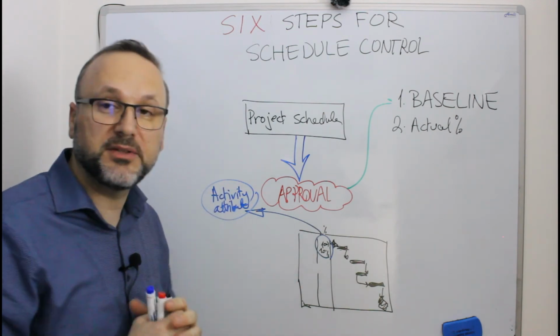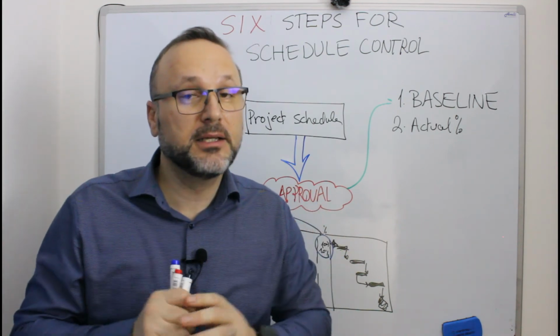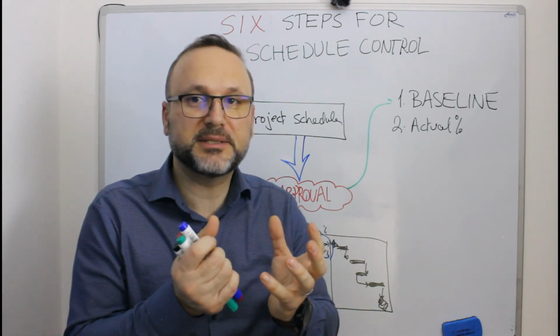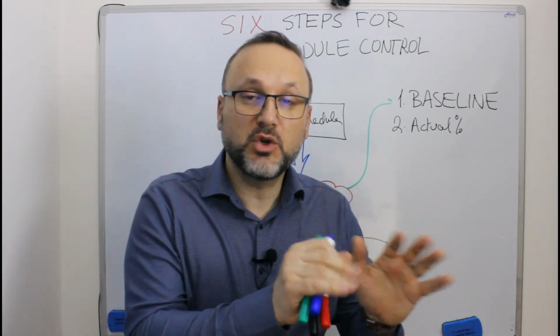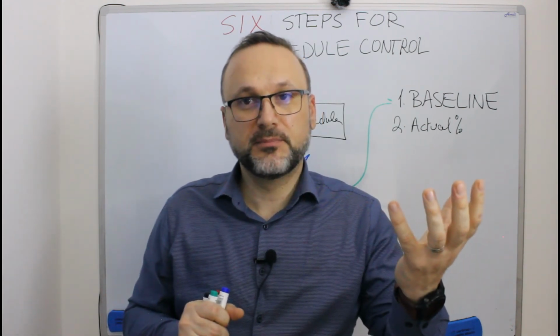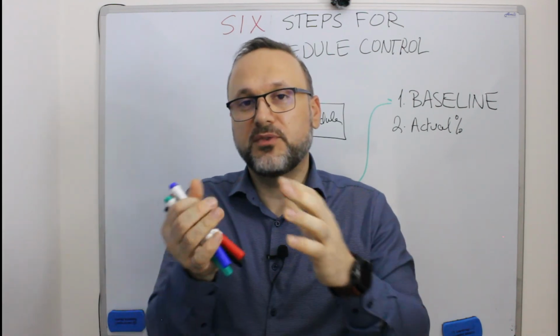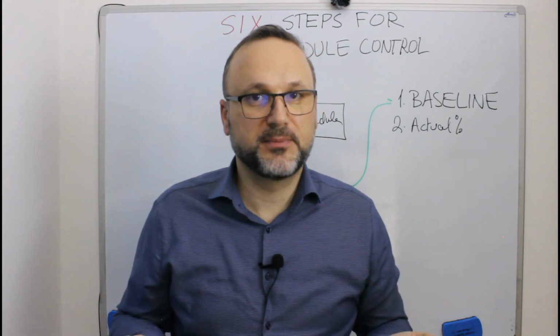Let's say in one activity, you have to deliver 10 documents. The value of each document is different, because if you have documents which are taking the time, it has more weight than the values of the documents which could be created within 1 day, 2 days.